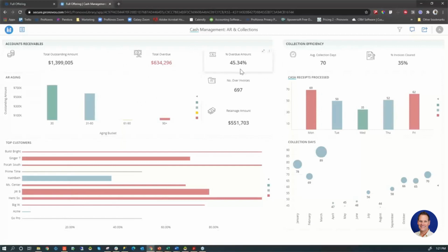How many total invoices are out there? We do have a maintenance division that does a lot of smaller jobs, so those obviously generate a lot of quantity of invoices that may not be terribly large. And also, what's the amount that's hung up in retainage, because we certainly like to look at managing that and billing that out as soon as we can. In some cases, we may be able to bill that out at 50% complete on the project.